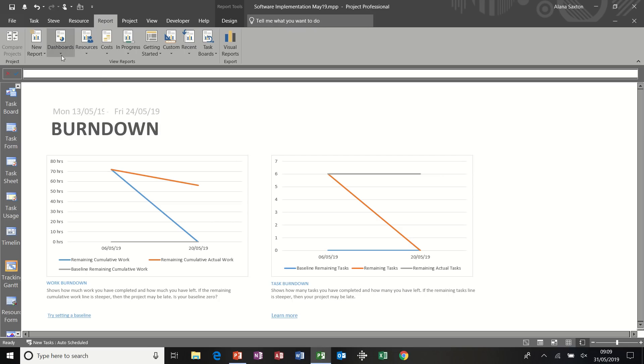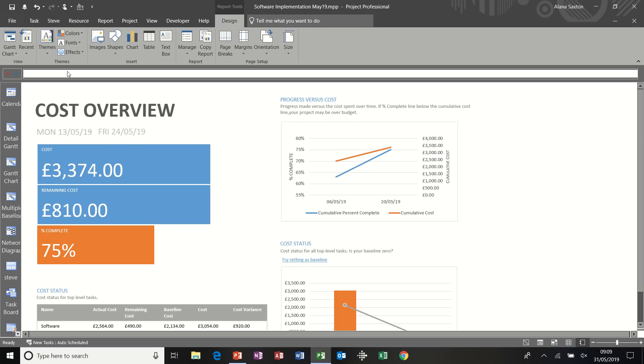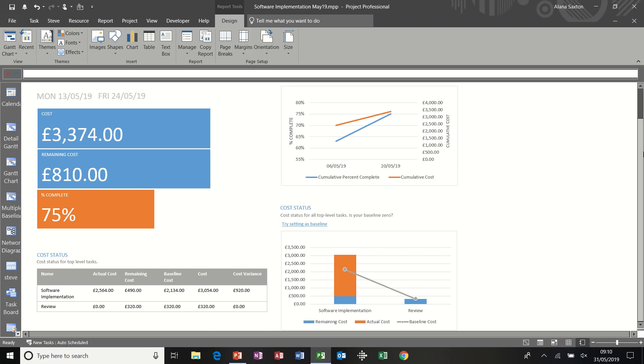If I go back to reports and maybe, let's have a look at cost overview. So this is telling me that the project is 75% complete. The cost is 3,374. I've got 810 pounds still to spend. So actual costs. And then you can see the graphs there. And what the implication is in terms of cost variance on this one. 920 pounds.